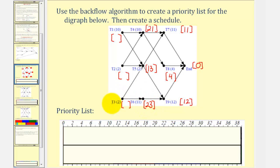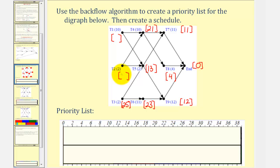Looking at task three, which takes two hours, the critical time would be twenty-three plus two, or twenty-five hours. Looking at task two, again we have to consider two paths. From this direction, the critical time would be thirteen plus two, or fifteen hours, but from this direction it would be twenty-one plus two, or twenty-three hours — so we use the larger, which is twenty-three. Finally, looking at task one, we must consider two paths. From this direction, the critical time would be twenty-one plus ten, or thirty-one hours. From this direction it would be thirteen plus ten, or twenty-three hours. So we'll use thirty-one.